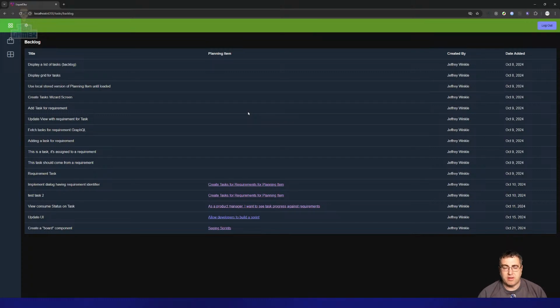It can be defined, the requirements can be defined in language that the product team understands, and the tasks that the story consists of are identified by the developers and broken down so they can be worked on in small, manageable pieces that they can then roll up into the greater story. If they find there are extra requirements, they can talk to the planning team. That can be reviewed and decided upon and then added, and that shift can be reported without any involvement of the developers.